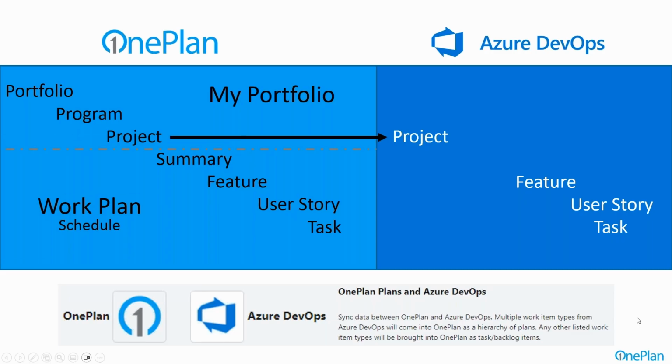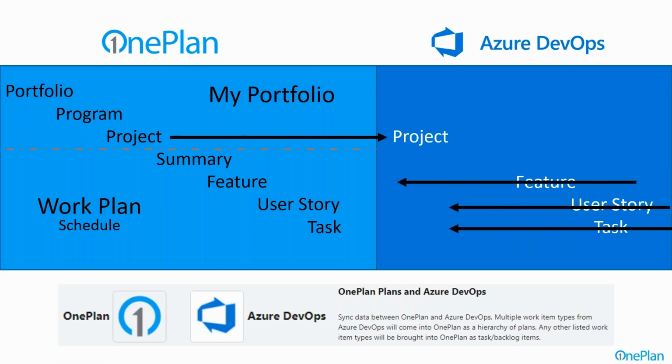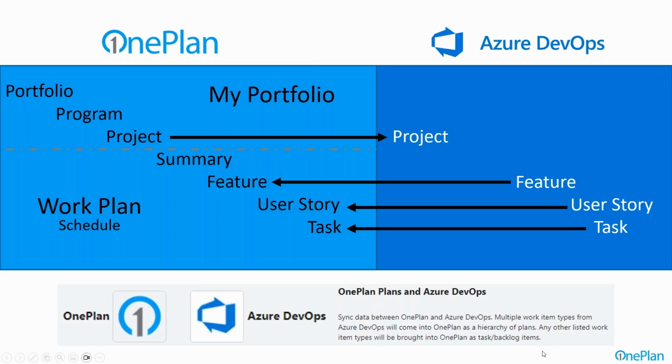And in that case, the project may be approved, and then the work elements may come back over into a schedule in addition to a backlog over in OnePlan, so that you can actually have the flexibility to have a hybrid schedule where you may have more waterfallish aspects of this, like in the overall requirements and design pieces that may not be in Azure DevOps, but the Azure DevOps component can be then intermingled into that overall schedule.